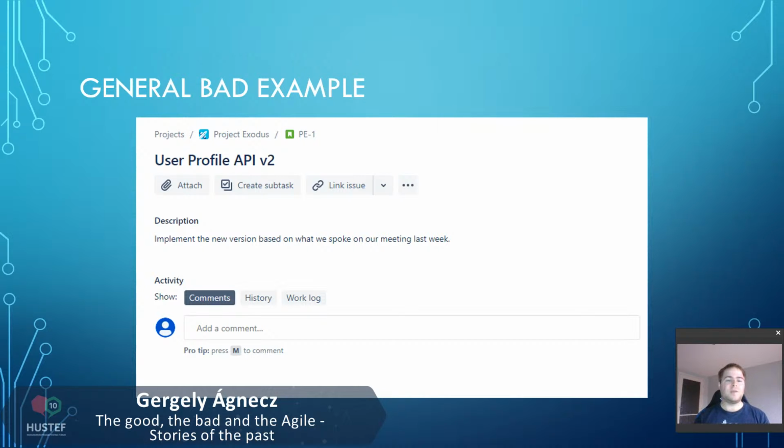We cannot work with such user stories because we have no idea based on the description what we are required to implement and test in the given sprint. This can be due to many root causes, for example, unclear communication, no business analyst, no vision, no business goals, and so on. The other bad point is that we cannot really estimate these stories because we don't know what we need to do and how long it will take.